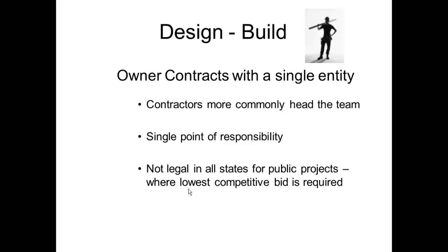Owner contracts with a single entity, single point of responsibility, not legal in all states for public projects where lowest competitive bid is required. There is an opportunity for some illegal activity with a design build, some negotiations that may not be totally above the table, so it becomes less transparent in a design build opportunity where you have contractors that may be pointing the fingers at somebody saying there's something going on here that's not right.